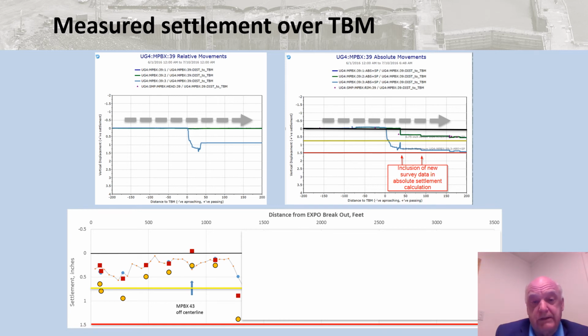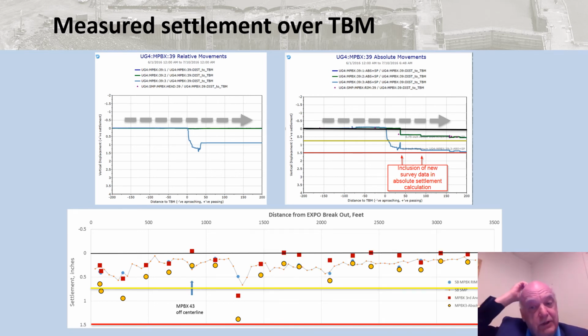And so we were able to tell them that right away. They were able to go inspect things. They found the machine itself had run out of materials for the tail grinding system. And so when they corrected that and proceeded with the job, here's what we see: continuing to do the job with less than 1/2 inch of movement from that point on. That piece of data helped convince people of the importance of watching the details and led to the successful completion of the project.